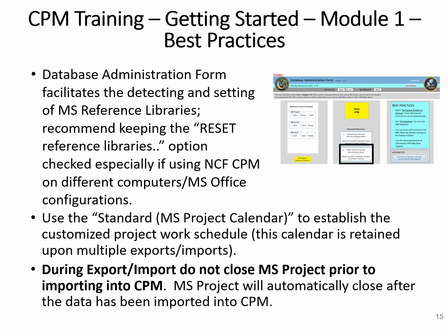Use a standard calendar when you're in Microsoft Project. Do not try to import a calendar from the command. It is not in the proper format. During export and import, do not use Microsoft Project prior to importing into CPM. Do not close Project prior to importing into CPM. If you do, there's a chance you can lose everything you did, and then you would have to re-export it and then re-import again.